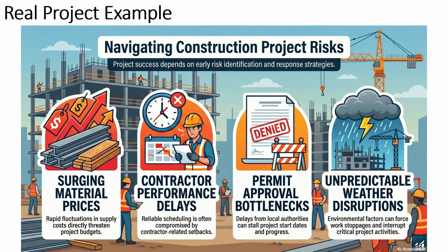The third risk is permit approval bottlenecks. In many projects, approval from authorities is required before certain work can proceed. If approvals are delayed, the project may face schedule disruptions even when the project team is ready to move forward.